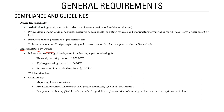A second important owner responsibility is IT-based project monitoring during implementation. This is applicable for thermal units of 250 MW and above, hydro of 100 MW and above, and transmission lines and substations of 220 kV and above. The web-based system should have connectivity with major suppliers and contractors to track progress, and should also connect with the centralized project monitoring system of the CEA. It should be used for monitoring compliance with applicable codes, standards, cybersecurity codes, and safety requirements.